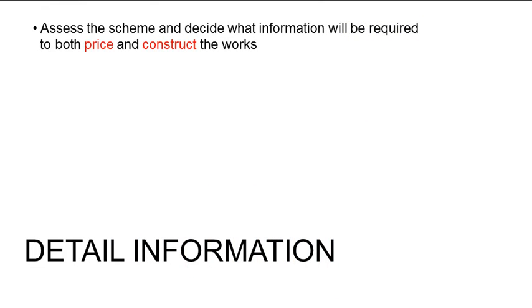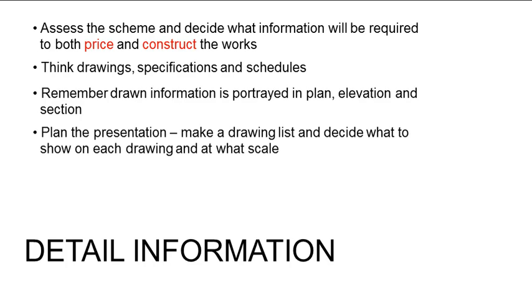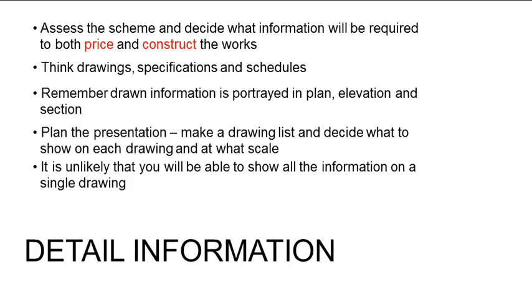The designer should assess the scheme and decide what information will be required to both price and construct the works. Think drawings, specifications, and schedules. Remember, drawn information is portrayed in plan, elevation, and section. Plan the presentation. Make a drawing list and decide what to show on each drawing and at what scale. It is unlikely that you'll be able to show all of the information on a single drawing.